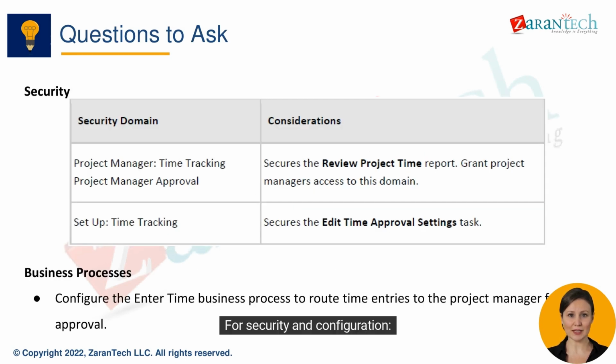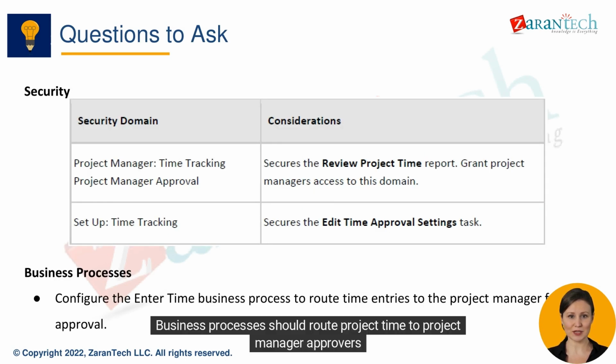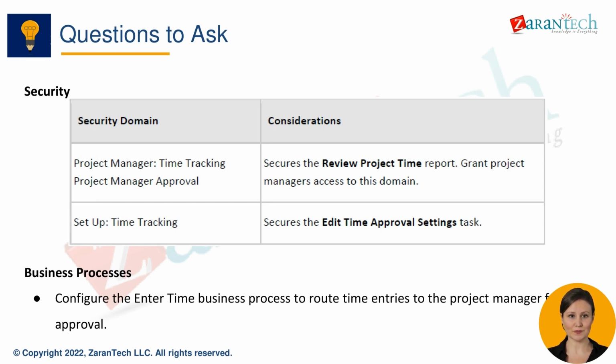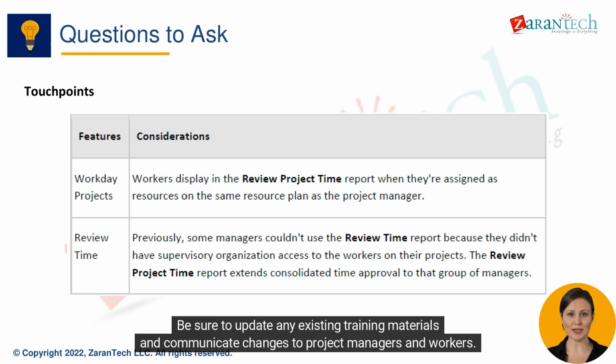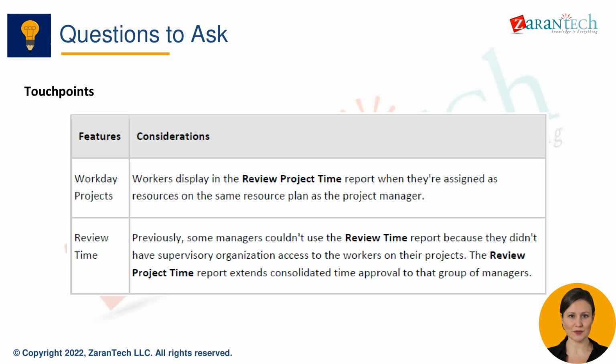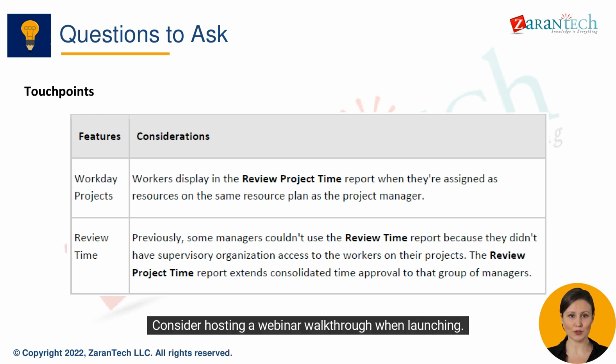For security and configuration, business processes should route project time to project manager approvers. Provide project plan security domain access via security groups. Be sure to update any existing training materials and communicate changes to project managers and workers. Consider hosting a webinar walkthrough when launching.